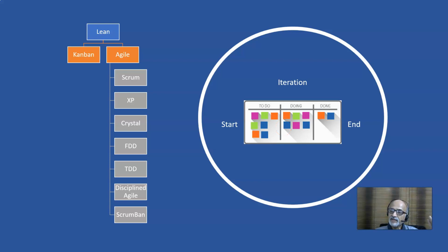So if you are new to Kanban, the best way to understand it is a continuous flow. Like in software development, or like defects coming in and we have to fix them, it is slightly unpredictable and very dynamic. So as and when a defect comes in, it goes into the to do, and then somebody fixes it, and when it is done, it moves on to done. Then we have the Agile. The essence of all Agile approaches is the iteration, because the work is broken down into iterations of 30 days or 15 days or 10 days, and every iteration starts with a planning meeting, and in the planning meeting they decide the to do, what are the things you should be doing, and during the iteration they do it, and then they complete it, and towards the end there is a review meeting.